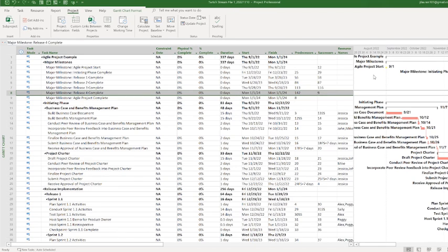Let's keep going. So this is the predecessor view here. This is your resource tab. It tells you if you got any resources assigned. Now remember, as mentioned in the previous tutorial, milestones do not have any resources associated whatsoever. Why? Because you can't associate costs to that, and it's a binary thing. It's either you did it or you didn't do it. So there's no way to really say, yep, check, this costs this much to do this milestone. Doesn't really make sense logically too. But if we were to look at some other task, we can see their units, the cost, who's the assigned owner, potentially even as well.